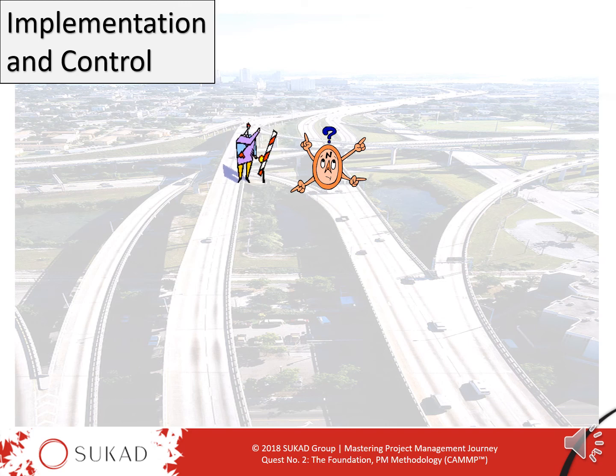And usually what we say is sunk money should not be considered in deciding whether the project should go ahead or not. The only reason you will decide to go ahead with this project is if you still believe that you can deliver benefits. Of course, you can still finish the project, but some damage is done. Either the project will finish behind schedule or above budget, or maybe you have to let go of some of the scope, or maybe you sacrifice some quality, but you can still deliver something at the end and you get benefit from it.